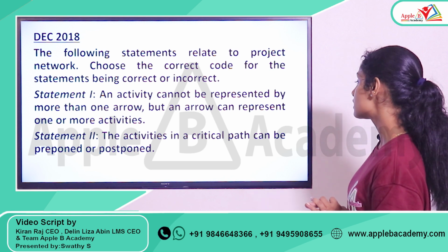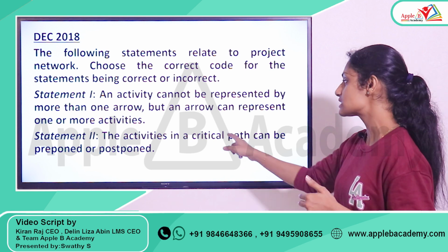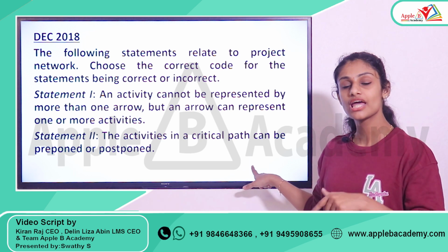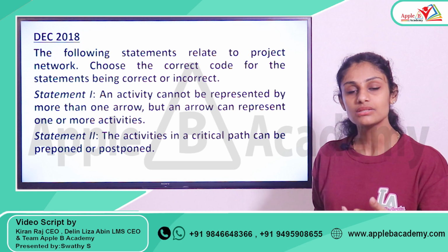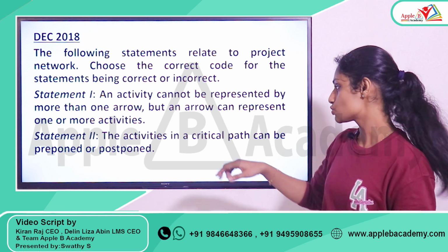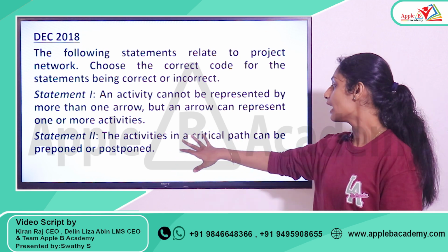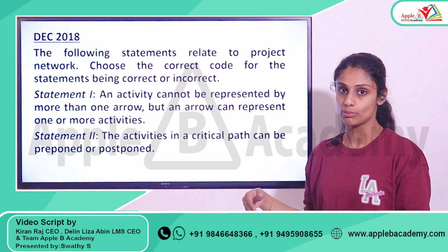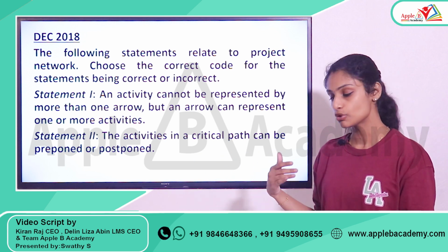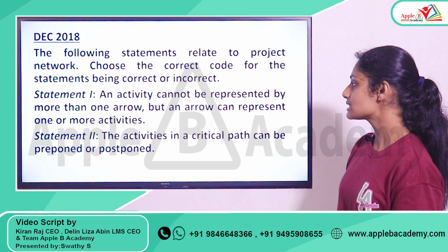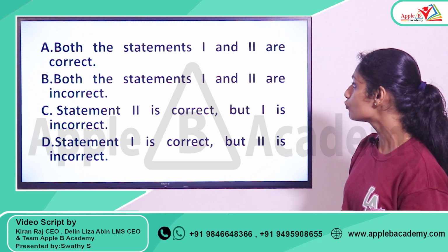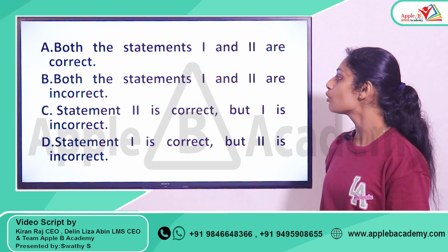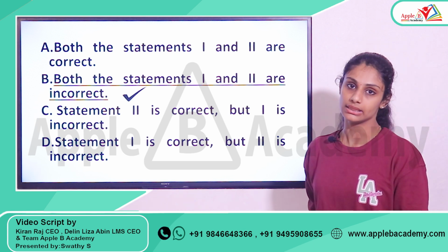The second statement says the activities in a critical path can be preponed or postponed. Activities in a critical path are known as critical activities, and critical activities can't be preponed or postponed. No, it's not possible. So both statements are incorrect. The option you can go for is Option B: both statements 1 and 2 are incorrect.